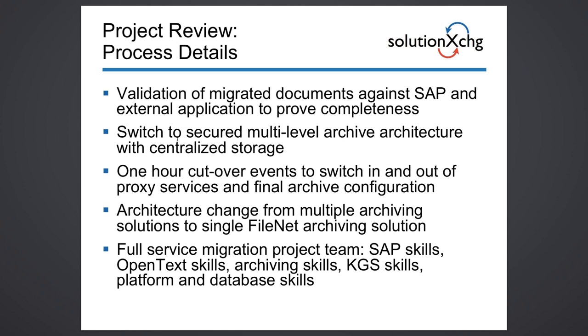That's about what it took us with all the bank's requirements around getting the people off the system, making sure multiple stakeholders were involved, giving their okays, taking down the system, switching over to the other archive, switching the configuration in SAP, bringing the system back up, and then doing some verification to make sure that the configuration changes actually were okay and everything was done.